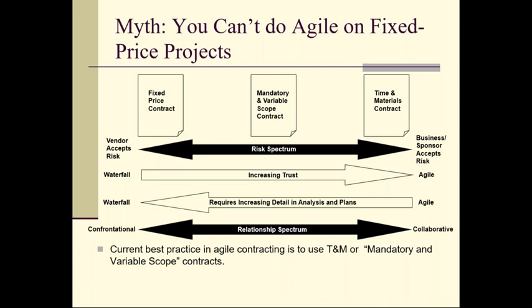So if the client, the buyer of services, is in charge and making all the decisions and steering the project, that's unfair on a fixed price contract. Because in fixed price, the vendor takes all the risk of overages, yet the client is defining the scope as they go, and the client could define a scope that's much bigger than the vendor priced in. The client could steer the project in a risky way that the vendor's not prepared to deliver. So again, who's got the control is mismatched with who's got the responsibility or accountability. So that's another dysfunctional contract model, an agile fixed price project, because it puts the vendor at tremendous risk under the client's control. The vendor has no way of controlling that risk.